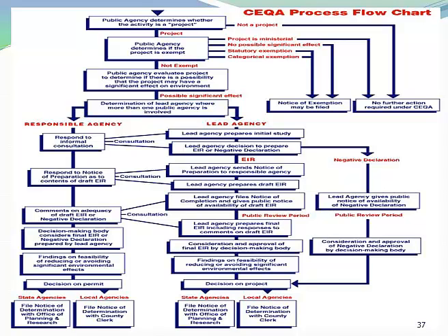Let's see if I can interpret that a little bit. CEQA would apply in two situations. If DTSC itself is carrying out a project, like orphan sites, or if, for example, Caltrans is going to build a bridge, they're a lead agency, so they're carrying out that project. Or if the work is being done by a private individual or corporation, in this case RPs, who have contractors, where they require our approval of the associated work plan and remediation effort.